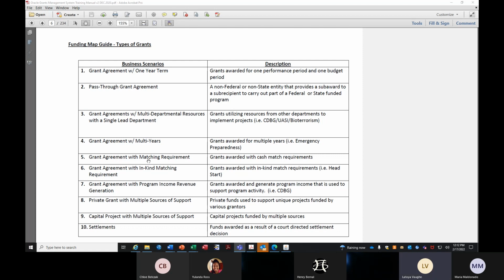However, some departments, especially like CDOT, will set aside, and I don't know if it's called force accounts, but they'll set aside a reserve for things that are going to be deemed ineligible, and they'll pay from local resources that they won't submit to the federal government or state government, but that was a part of the project cost.